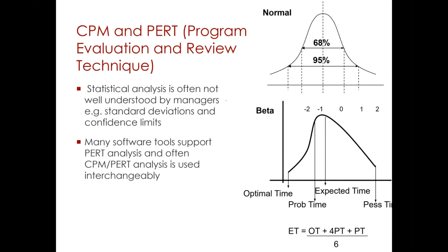The problem we see in construction projects is that statistical analysis is often not well understood by managers, especially the concepts of standard deviations and confidence limits. As a result, you will see very limited application of PERT methods in construction projects. Many software tools support PERT analysis, and often CPM and PERT analysis are used interchangeably.